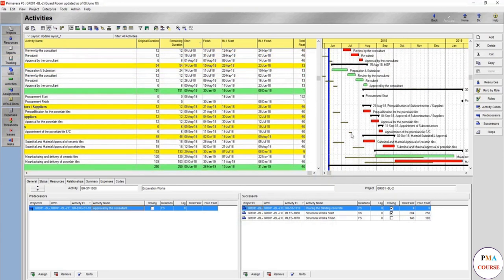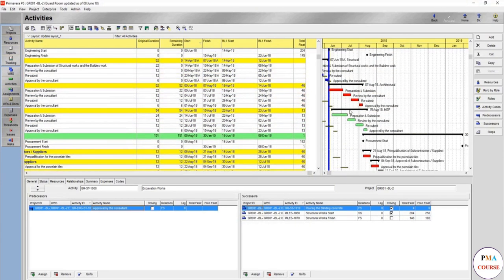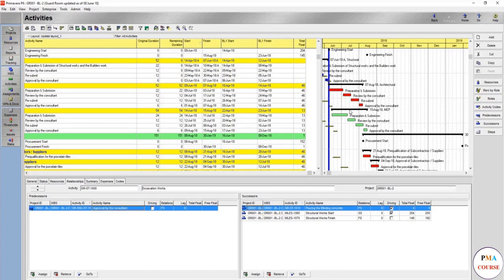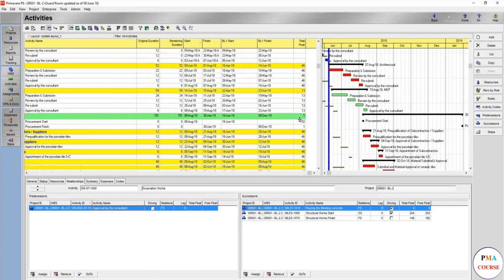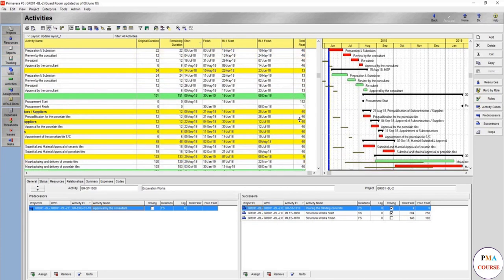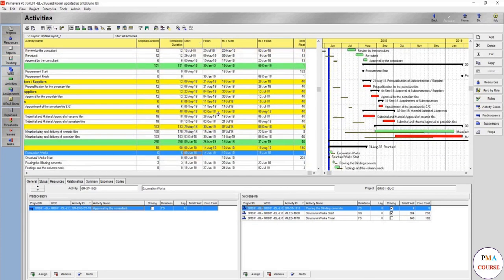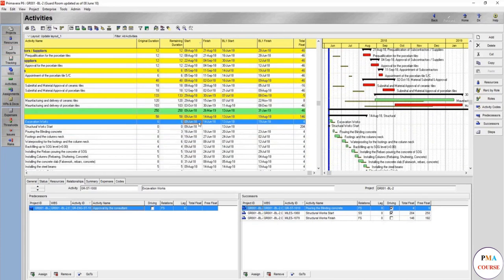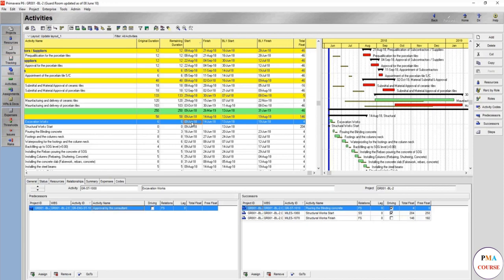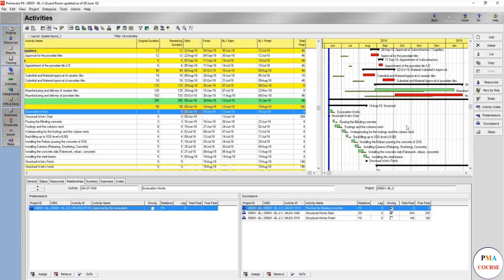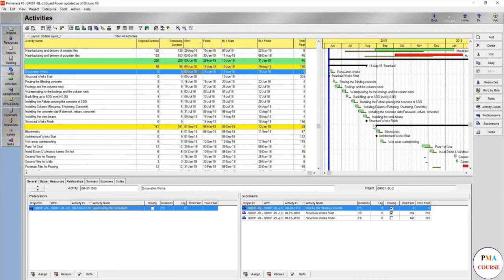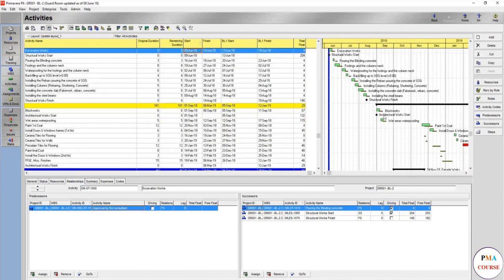You can add the dates column, baseline one date, baseline finish date and baseline start date to see when they were supposed to run. This one was supposed to run on 13 June but it's going to run on 9 June because it's not driven by anything anymore. Let's check the options and make progress override. Will it change anything? Wait and see, nothing. I need you to check this by yourself and even comment or ask about it. Check the difference between the progress override and the retained logic which is very important.